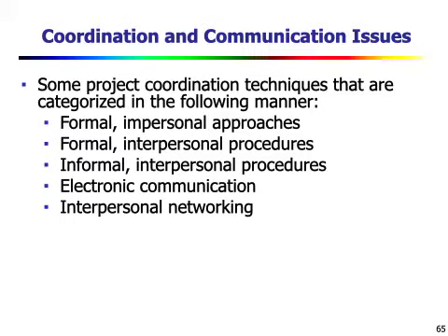The scope is defined by answering questions on context, information objectives, and function and performance. The questions related to context: how does the software to be built fit into a larger system, product, or business context, and what constraints are imposed as a result of the context?